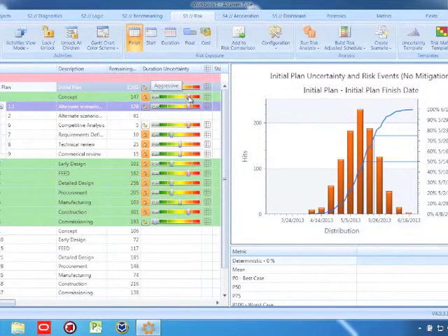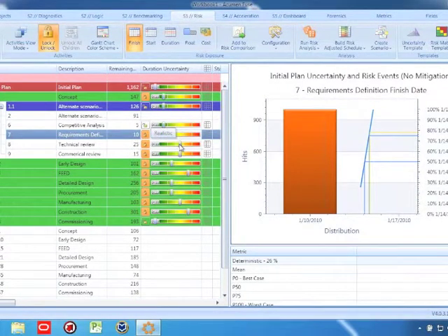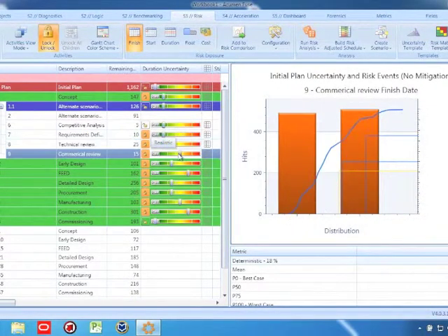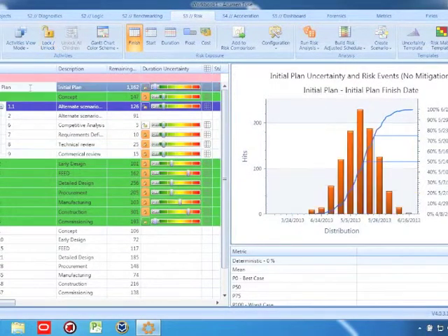So I basically have two choices. I can move my schedule, or I can find creative solutions with management to move these sliders to a more conservative state. Once I've made them more conservative, if I run the Monte Carlo simulation again, this deterministic date may very well go up from 0%.